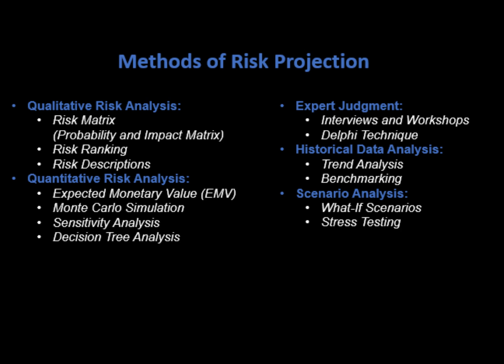Fifth, scenario analysis. What-if scenarios. Develop hypothetical scenarios to explore the effect of different risk events on project outcomes. Stress testing. Assess the impact of extreme but possible scenarios to understand the resilience of the project or organization.